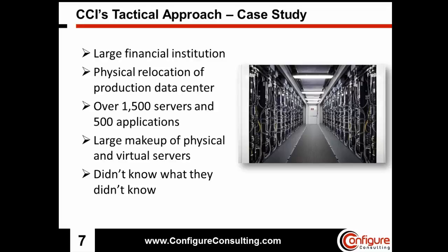And the more extracts that they got from their service desk, the more people that started analyzing that data, they ended up with 10 to 15 different spreadsheets created by different people, and they found that trying to create move groups this way was entirely inefficient and very risky because there's a great chance of something being left behind.